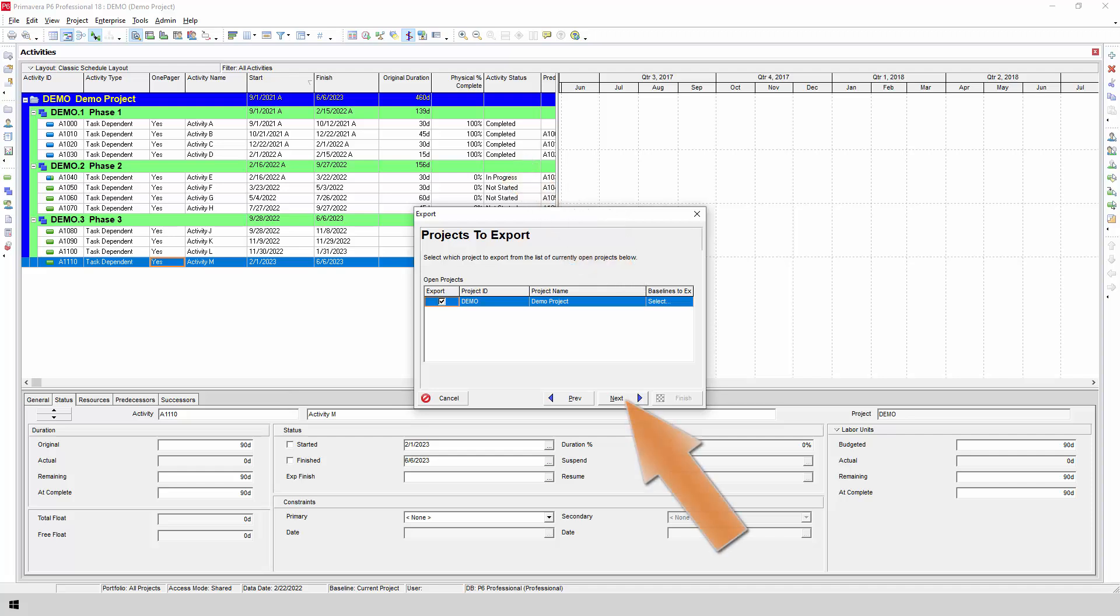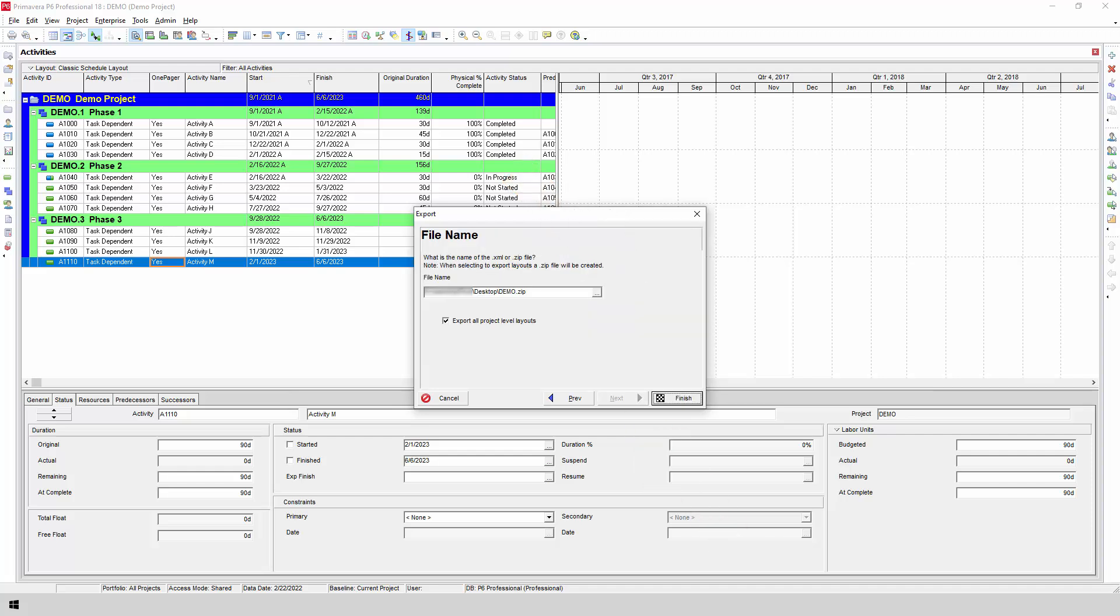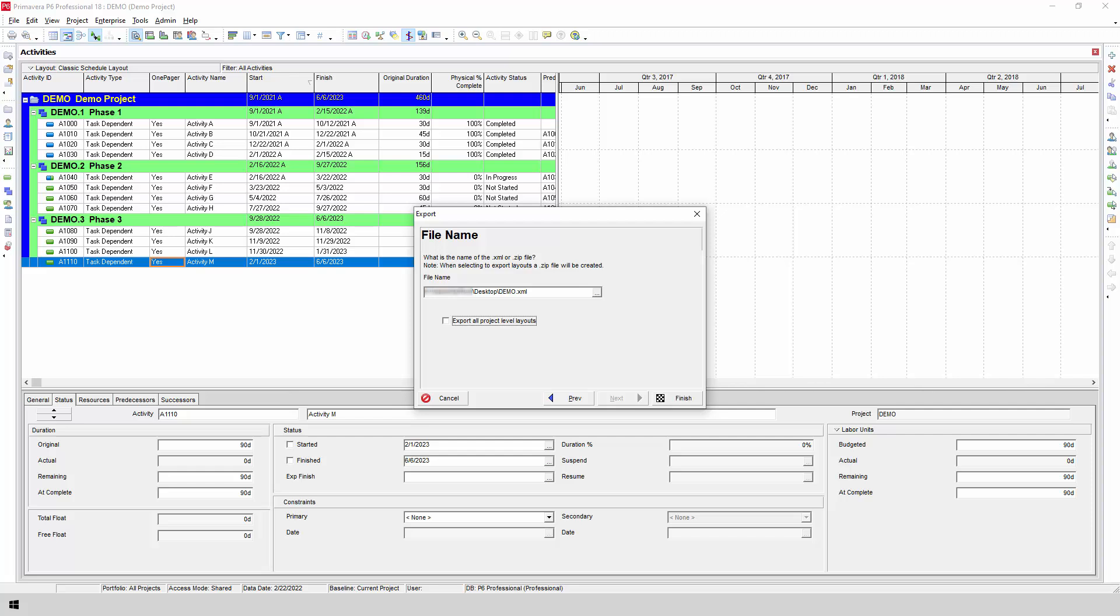Click Next and then confirm the file name and location of your export. If you see that Primavera is about to export a zip file instead of an XML file, it's probably because the Export All Project Level Layouts box is checked. You can uncheck this box to get a straight XML export instead. If you forget to do this, OnePager can automatically unzip the file and get to the underlying XML document as part of its own import process. Click Finish and P6 will complete your export.